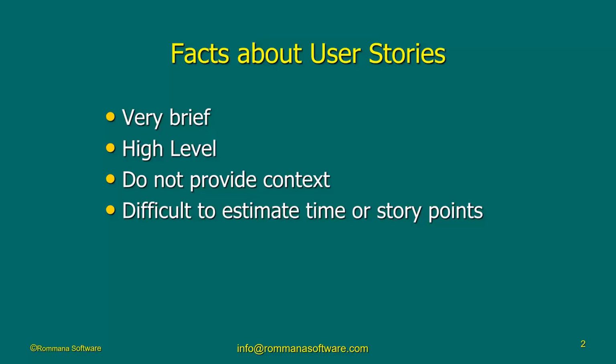Of course, let me just continue the last bullet here. It's also difficult to estimate time for user stories. I know some people are using the concept of story points, but story points are different from how much time it is going to take me. Remember, the old-fashioned project management cares so much about how much time it is going to take us to finish this piece of work. We had some experience with requirements to estimate how much time we need to implement a requirement. And we used something like function point, not user story points, of course, but function point is a much more robust approach to estimate the time that we need to implement a given requirement.